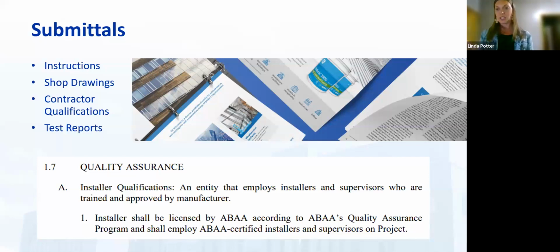So other ways that we've seen around this, I'm sure you've seen it as well, is, okay, maybe we have the standard be ABAA certified as a contractor, which just has them demonstrate that this is a serious business for them that they've invested in. And as such, typically one would say they are more qualified in installing it simply because they've gone through the effort and paid the money to be certified. However, you could also require X amount of projects of this size and referrals, right?